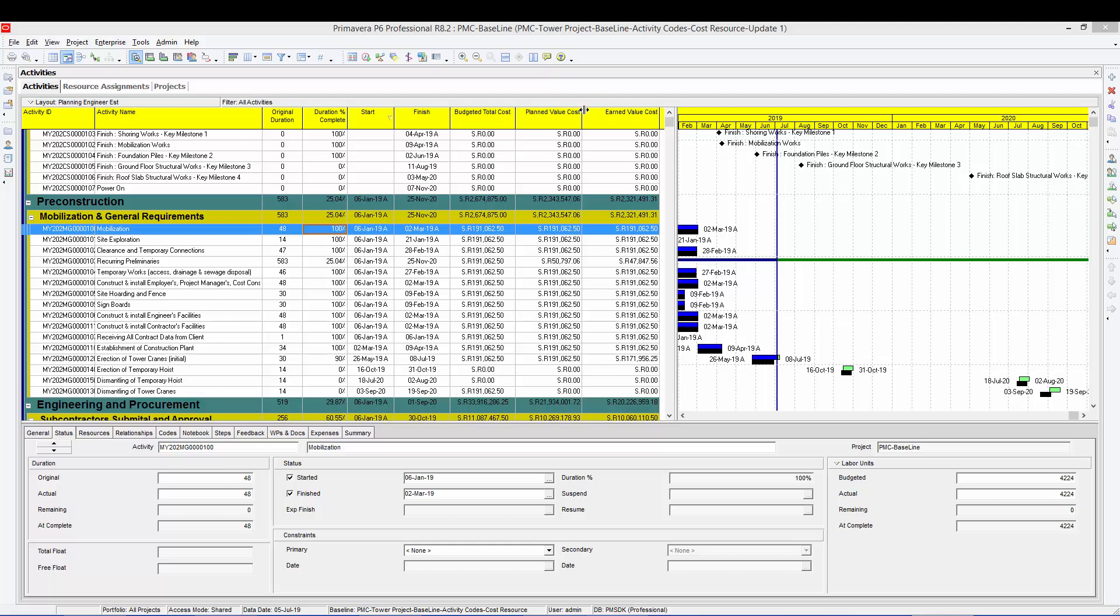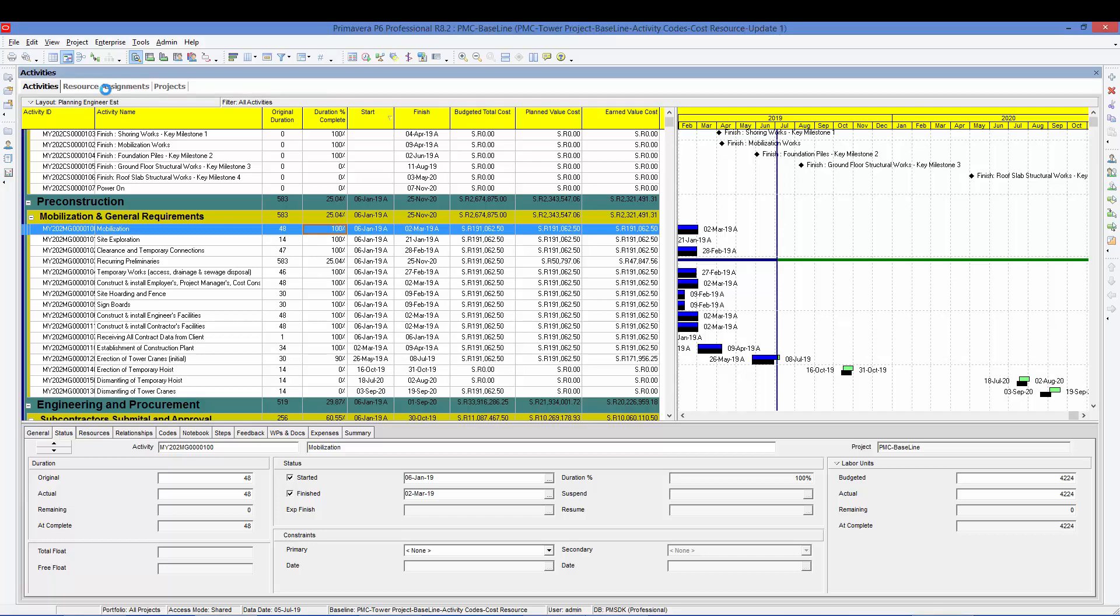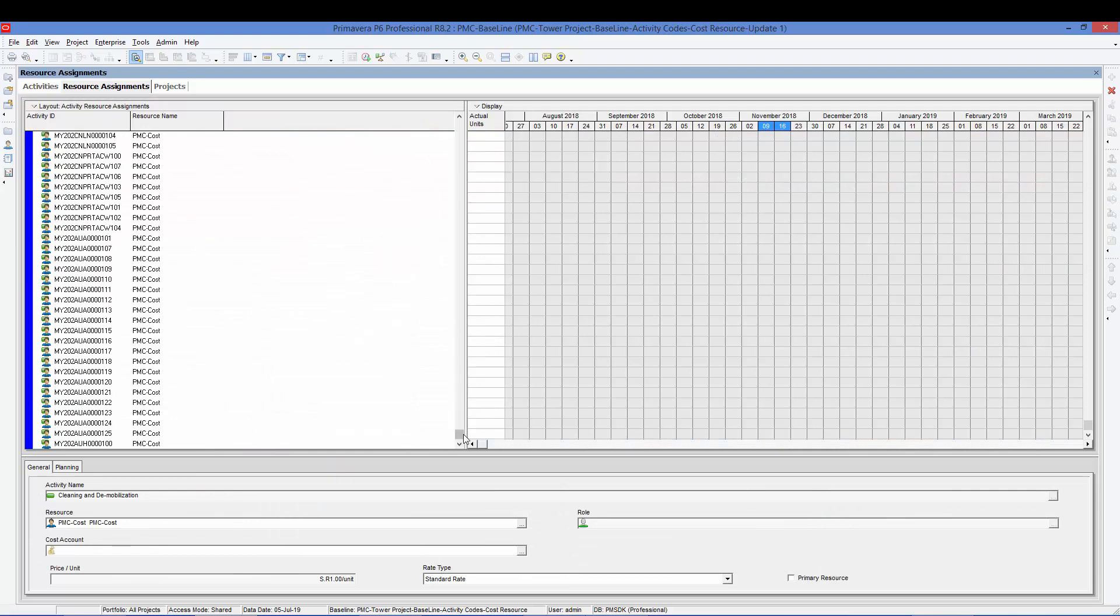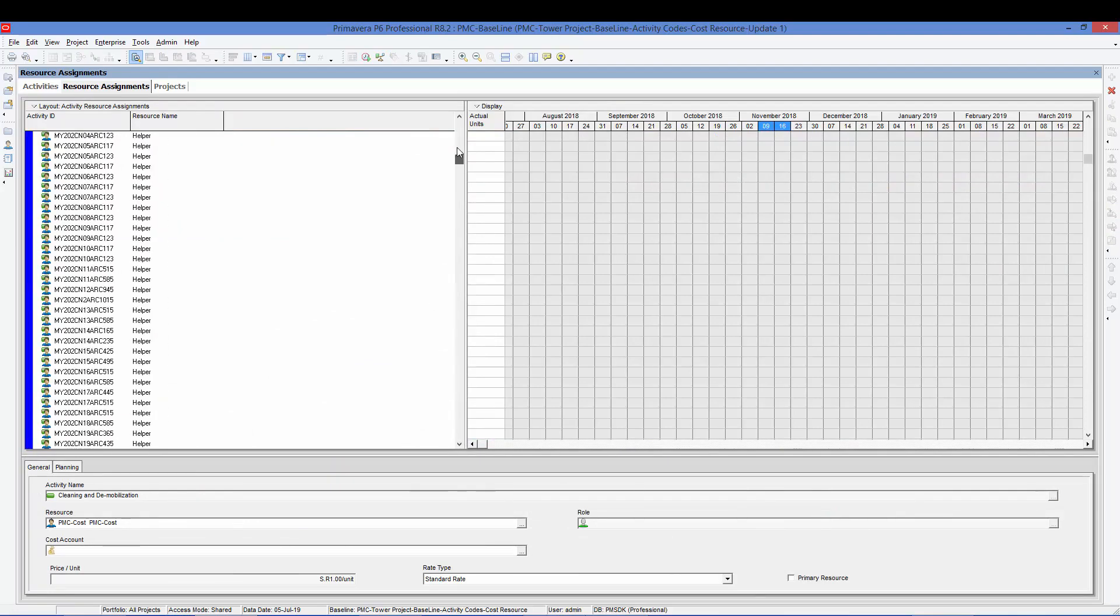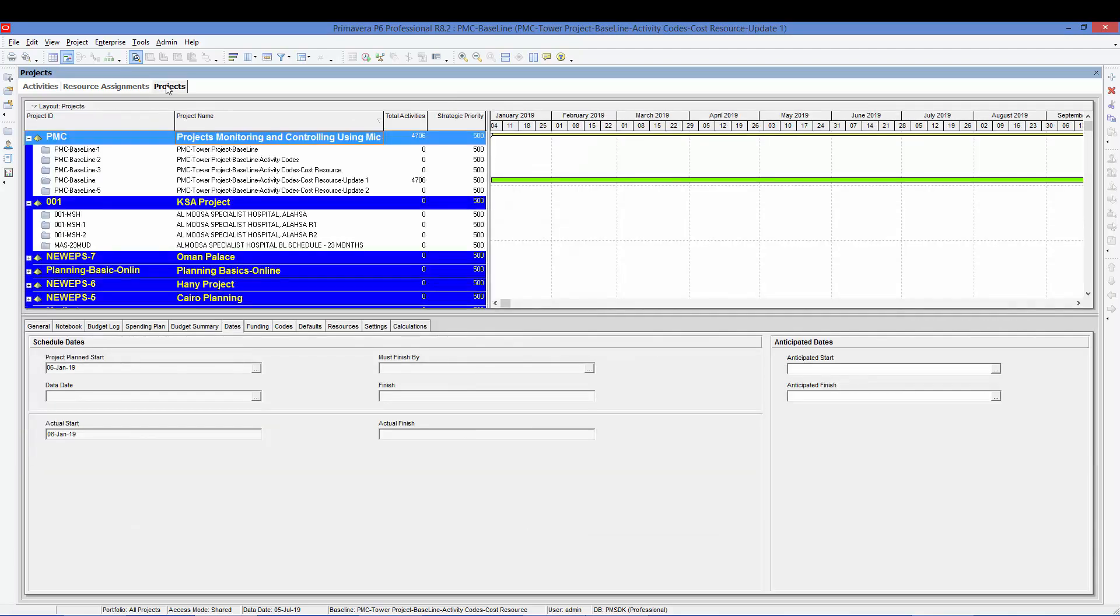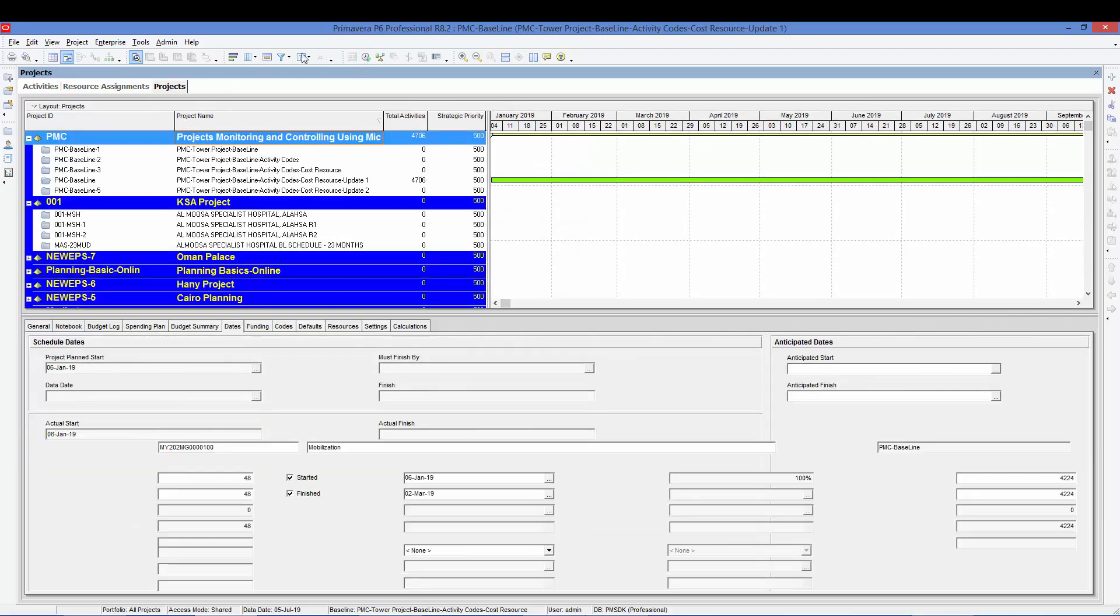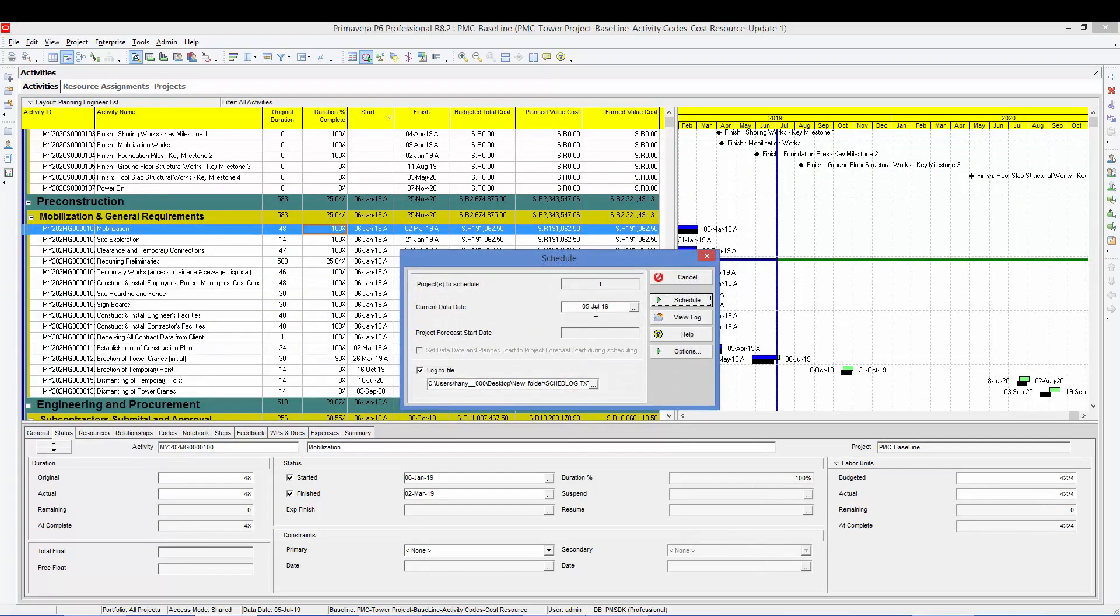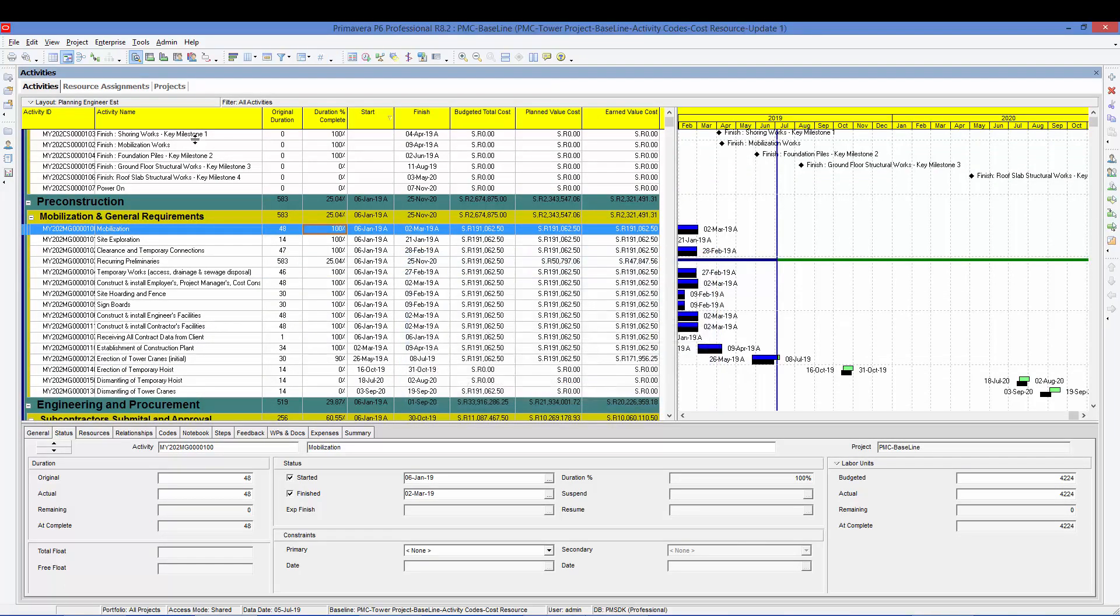So let's start immediately. Now we have the update number one. So we'll go to the resource assignment. And we will start copying now, same what we did in the plan. But here we will choose the actual units. So here we have the actual units according to the update. And this update is showing a data date. We need to know this one. Here our data date is 5th July 2019.